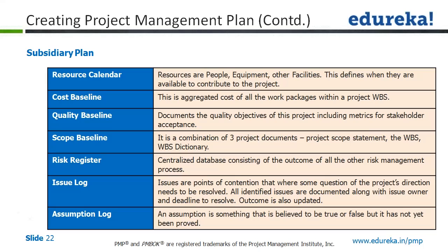Remember, we discussed these three plans yesterday with a message very clearly that once these plans are approved, any changes to these three baselines after they are frozen can only be done by the change request management process. That means we need to bring back the issue to the change control board, which is CCB, and only then can those changes happen.